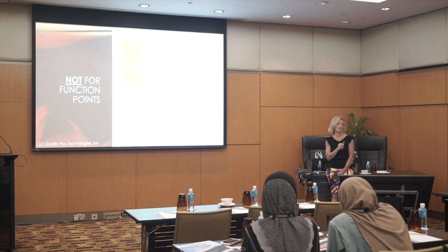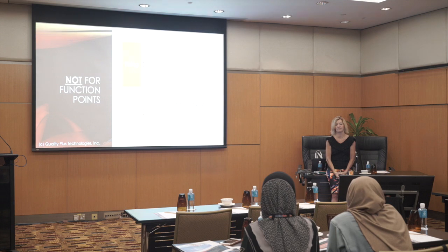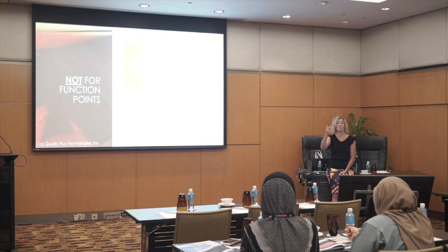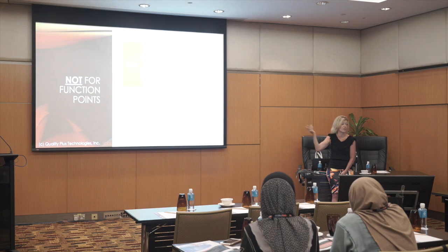When you're doing an estimate though, what if I have a piece that is construction and a piece that is maintenance? I have to do 2 estimates and using 2 different equations. So my first estimate is I've got this many function points, run it through the equation. The second one, which says I also want to do maintenance, I might have to do in terms of hours or some other cost.